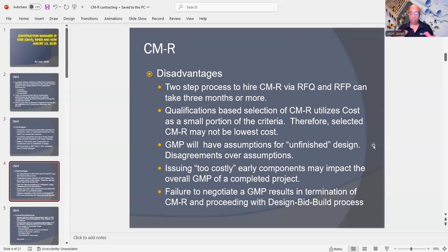And what's in that RFQ to see if a contractor is qualified to do certain work would be the history. When you look at the history of a contractor, how many claims have been filed against that contractor for projects that they have bid on? Also, did this contractor walk off the job or breach the contract?